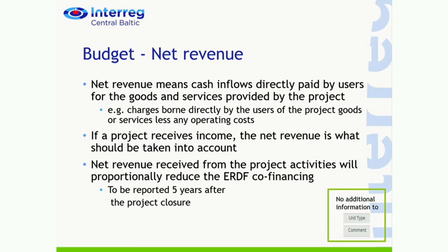So it's an allowed procedure, a possibility given. It's nothing illegal: if there is revenue generation, then it just needs to be reported and paid back later during the 5 years. Why we advise not to use it: it's complicated. The calculation is complicated, you will have the need to report later and so on. But of course, if the nature of the project is such that you develop something that will generate revenue, then you should go for that as well.